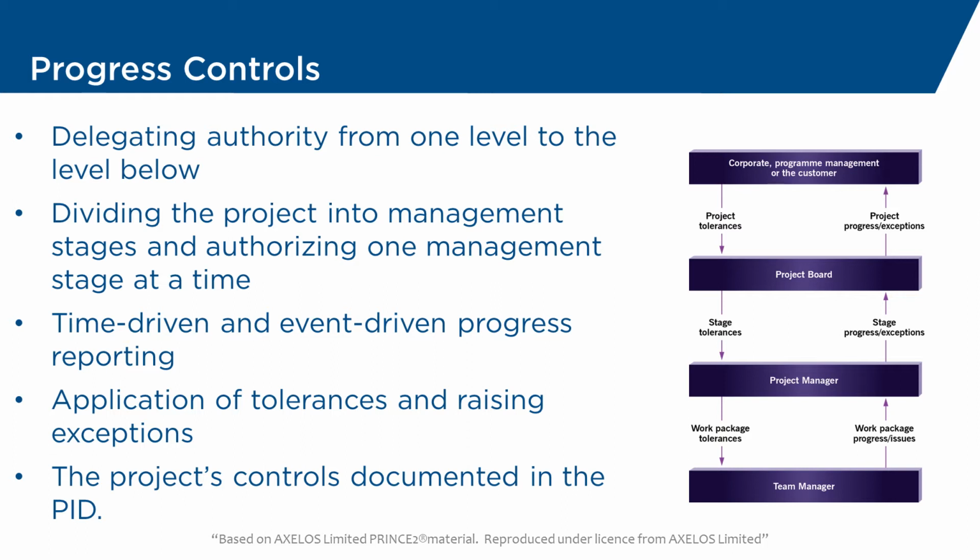In addition, we will have reports. So reporting is a form of control, and that means that information from the team level will be flowing up to the project manager through some kind of checkpoint report. Project manager reporting up to the project board using a highlight report.